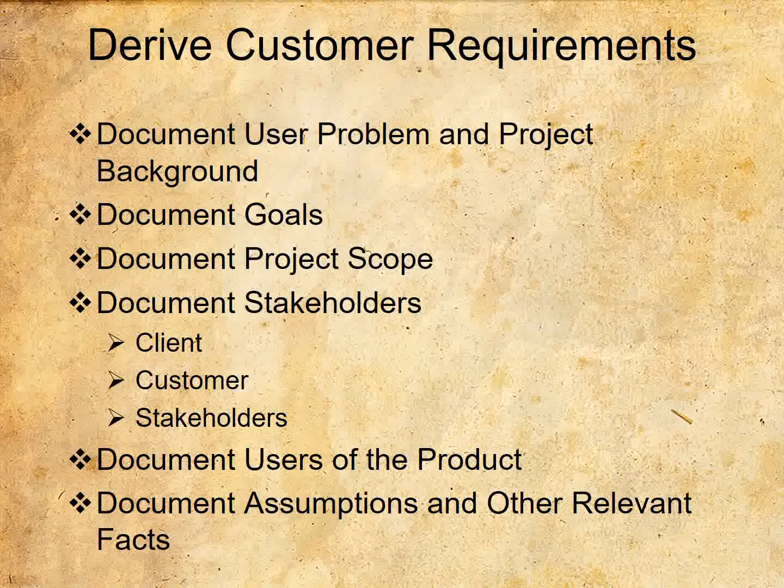A requirements analyst needs to derive the customer requirements from the project scope and the description provided by the requirements providers. Major features are determined that are required to support the to-be process vision and the to-be architecture vision. The requirements are expanded and analyzed to the point at which they can serve as the basis for the sizing